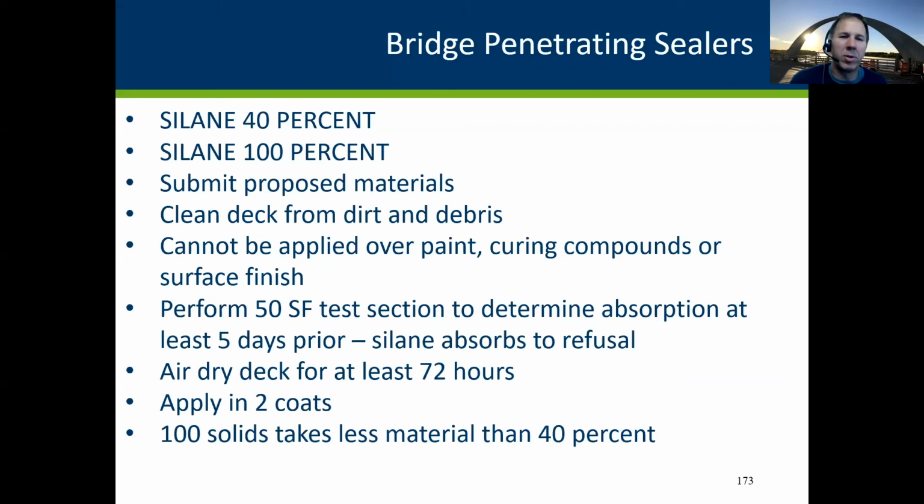The spec talks about 2 coats no matter what. So you'd have to prove it out by your test section whether that can be waived. And then we don't want the deck to be kind of rained on and then come out and expect this silane to absorb. It has to be a dry deck for at least 72 hours.